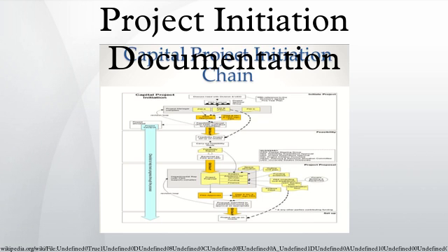Quality plan. The project quality plan is usually written by ITQA and it identifies aspects which will be delivered as part of a project: use cases, high-level design, software requirement spec, test scripts, test report, post-development review, and stage assessments in a project quality plan. ITQA also determines when the end-stage assessment will be taking place. These are basically checkpoints during the life of the project which ensure that a quality product is being delivered.